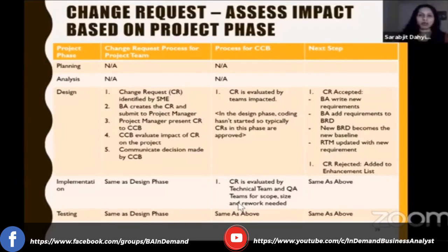So let's say if this project is for, like when you go to a doctor's office, you have the patient onboarding screen, right? This is when they take your vitals, like your blood pressure, your glucose, right? And this project is only focused on the patient onboarding when you first go to see the doctor's office. But if a doctor comes along and says, I want to make a change to some other screen, well, that's not in scope for this project, so we can't accept it anyway. Does that make sense? So the high level scope of a project is given to you before the project is handed over, assigned to you as a BA.